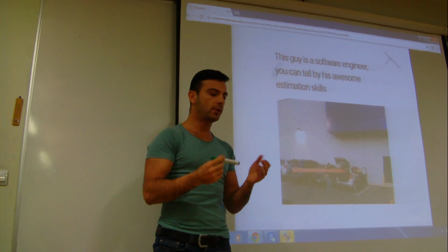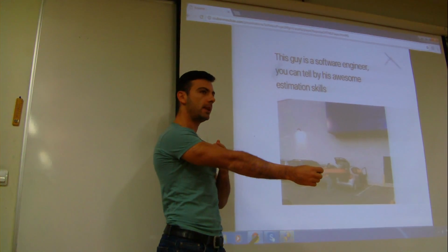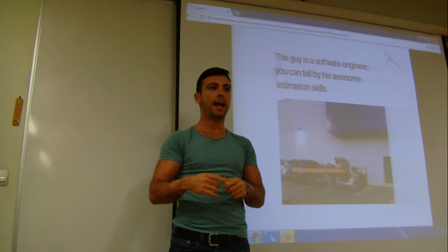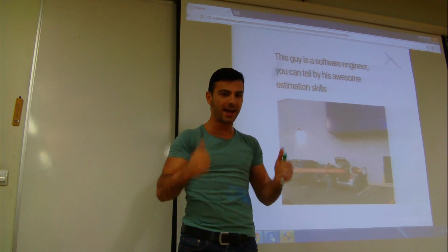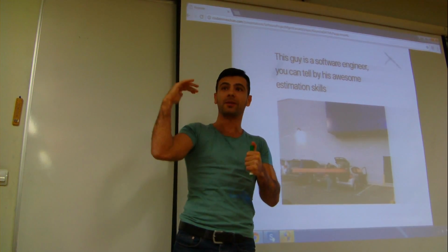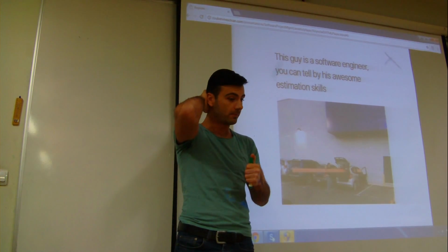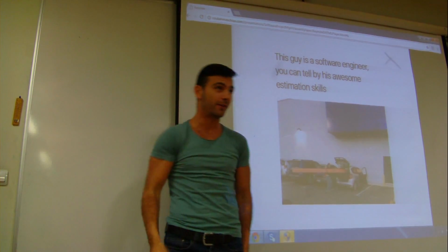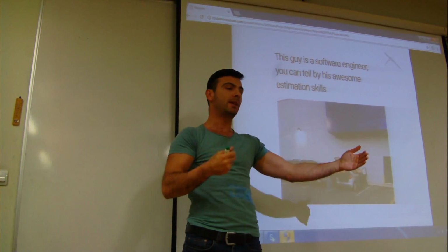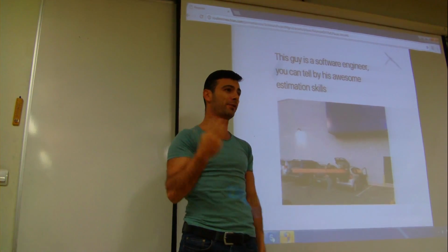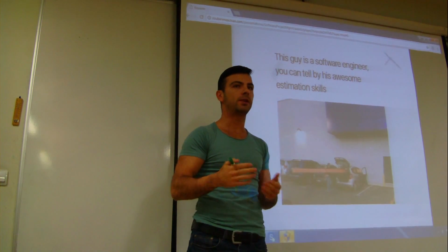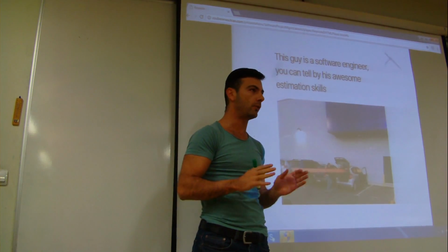So what do we do? Well, it turns out that estimating long term is practically impossible, right? And if you ask an engineer, will you build this in 1 year? And engineers are optimists. You know, they'll say, yeah, I can do it. And then they start coding and realize all the problems that happen along the way and go, oh, oof. And then they come to your office, oh, sorry, it's not going to happen. If they give you an estimate and say, I can get this done in a year, it might take 3. Literally, this could happen. So long-term estimates, generally speaking, are incredibly inaccurate in our industry.